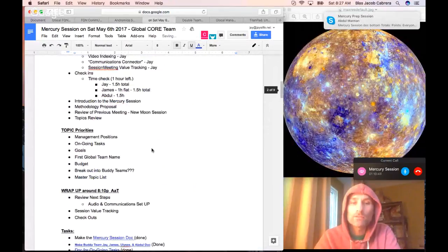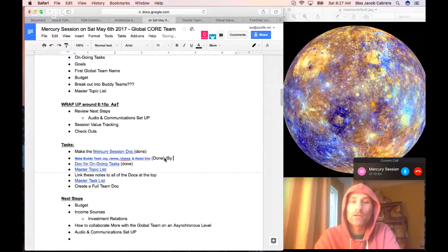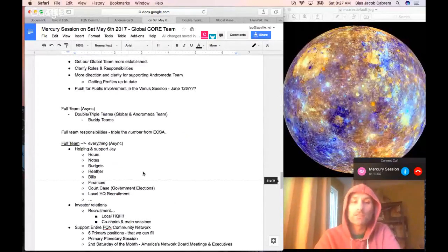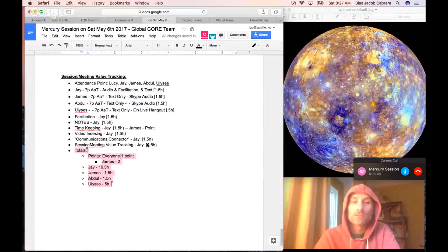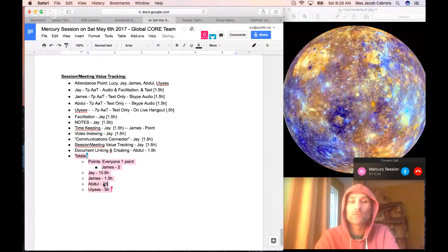When you're doing tasks, be sure to mark it as done, but by who? We also want to mark who did the task so that we can give people credit and make sure they're getting more value based on the tasks they do. If Abdul was helping with some of the documents, we could say document linking and creating. Maybe this is Abdul. Abdul, did you do that? Yes. So Abdul would get an additional 1.5 hours, so he would be at 3 hours.